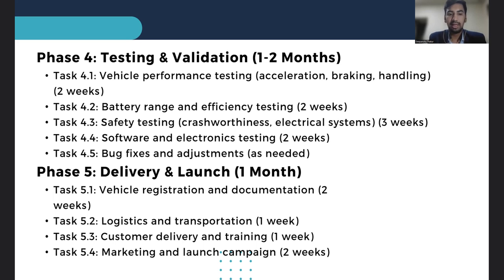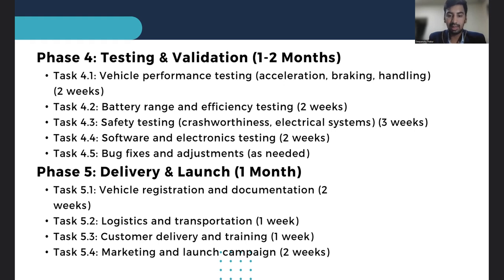The final phase is delivery and launch of the EV vehicle, taking around one month. It involves vehicle registration, logistics, customer training, and an exciting marketing strategy or campaign for the new EV vehicle.